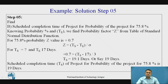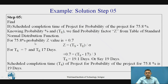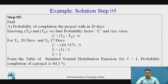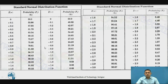Here the reverse approach is used: they give the probability completion percentage of 75.8 percent, and we need to find the normal deviate Z value. From the table, looking up 75.8 percent, the corresponding Z value is +0.7.